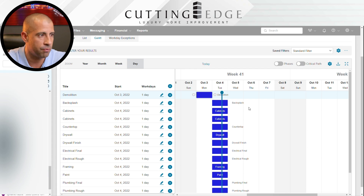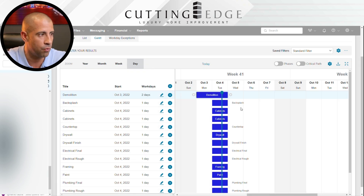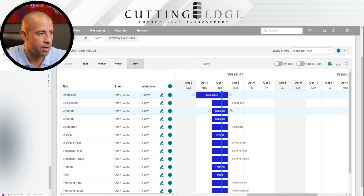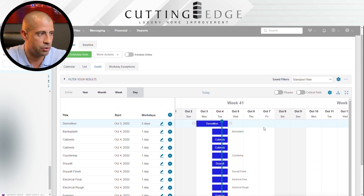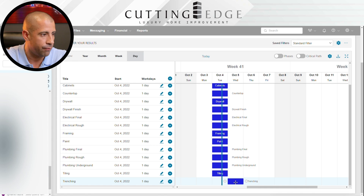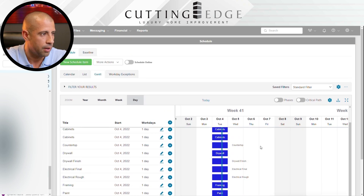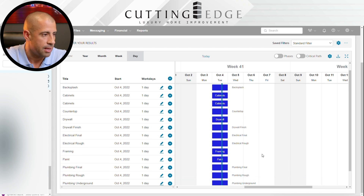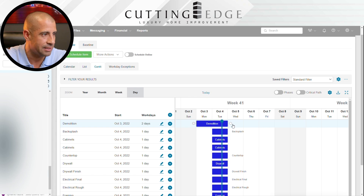Before I can bring anybody in, I need to demolish and remove the old cabinets, remove the walls, remove the tiles, remove the plumbing fixtures and appliances. By knowing what I'm demolishing, I'm going to assume it's going to take two days. Right now all these activities are happening on the same day, which is impossible — so that's when I need to move my activities. After demolition, my next activity is going to be trenching, because I need to open the floors for the plumber to do the underground work.